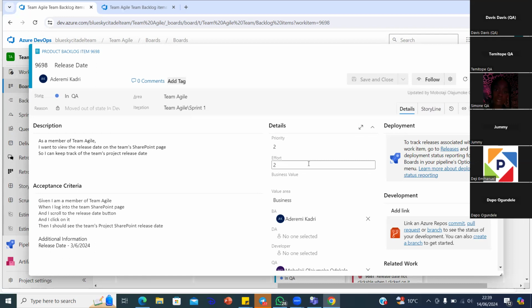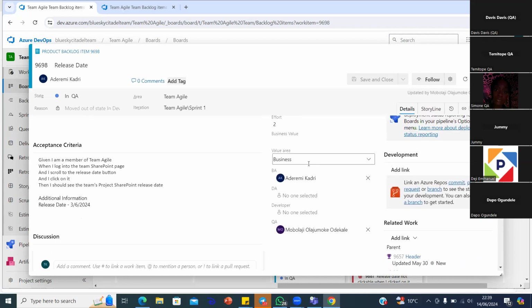This time around, can you scroll down to the date? Can you log in? It's all those things you need. Is the date still visible? Exactly. You need to ensure that those are still working, so that you don't just go and say, okay, clicking is working, there you go, happy days. No. You also need to ensure that things you've tested before are still working.